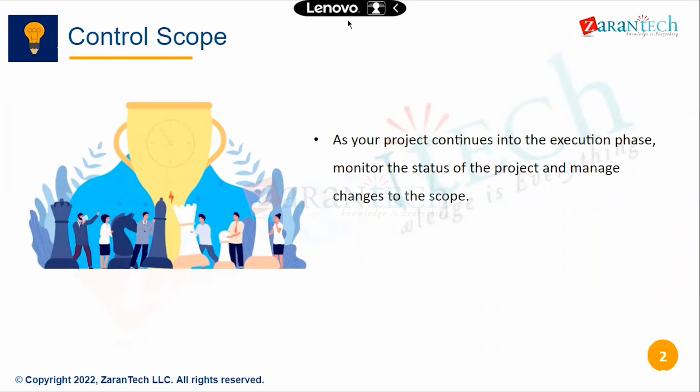How the changes are handled, that we will be drafting as part of even the control scope. Right? Is there any formal change control board or not? Right? If not, how are we going to handle it? Therefore, again, even this change control can be even scope control also. Right? Scope, say for example, 5% change in scope, minor risk, 10% change in scope, major risk, 25% change in scope, critical risk. Therefore, how are you going to handle these changes in the scope?